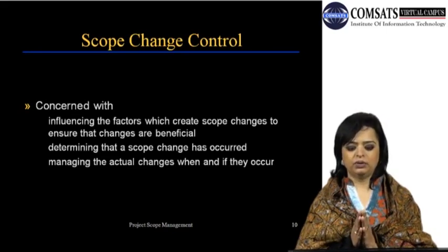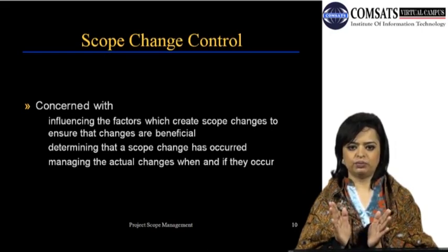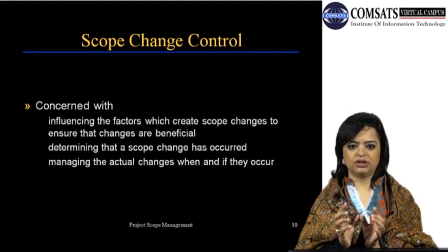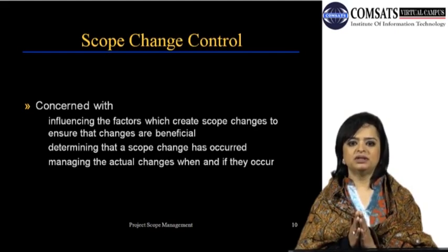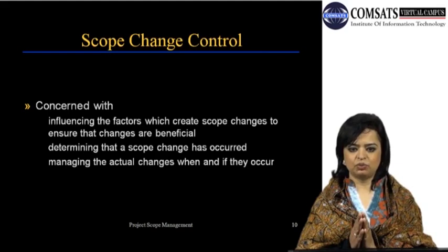Once we all feel good about what is required from this project, that is the time to baseline a project scope. From this point onward, you take a snapshot of the project and everybody is in agreement of what is required of the project. All updates, all modifications are not considered changes at this point in time.